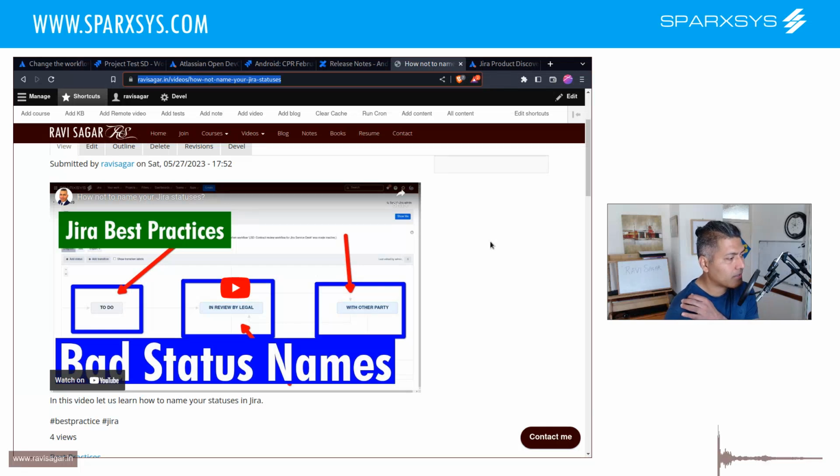So you don't really need to create a status like, okay, I'm waiting for something from Jack, or I'm waiting for something from Jessica. That is not really a status. That is basically messing up Jira configurations. I mean, you can do that, but don't do it. You can always use your column names in your Jira board, not the workflow, especially if you're using a Scrum board or maybe a Kanban board. I guess we have boards in a lot of places now.